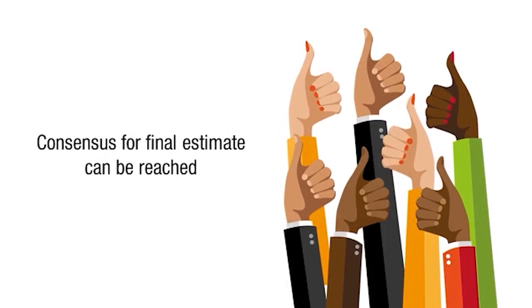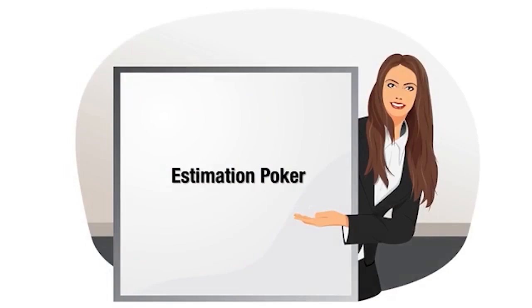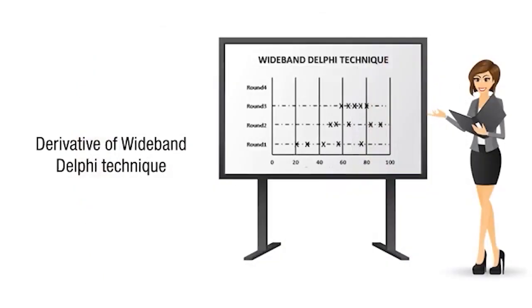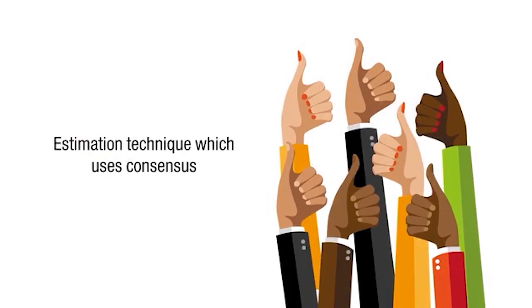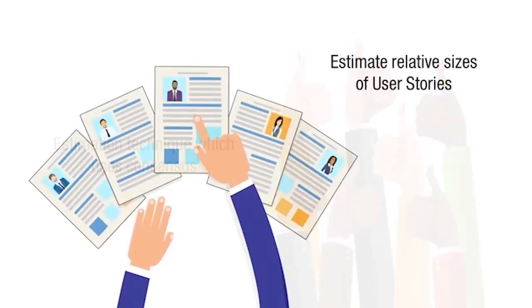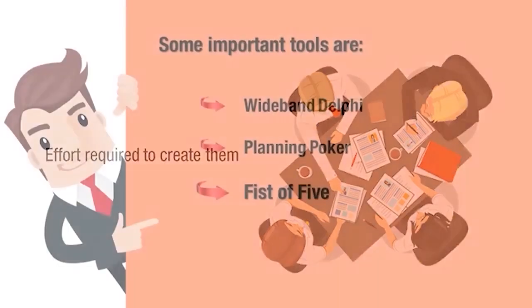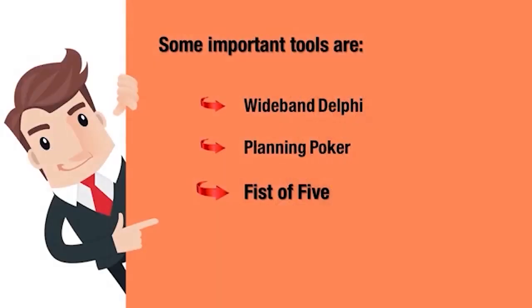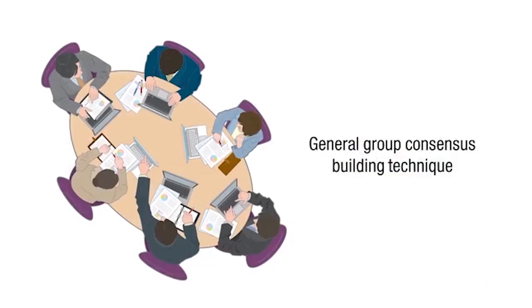The second technique is Planning Poker, also called Estimation Poker. It is a derivative of the Wideband Delphi technique — an estimation technique which uses consensus to estimate relative sizes of user stories or the effort required to create them. Next is Fist of Five, a simple and fast mechanism used as both an estimation practice and a general group consensus building technique.